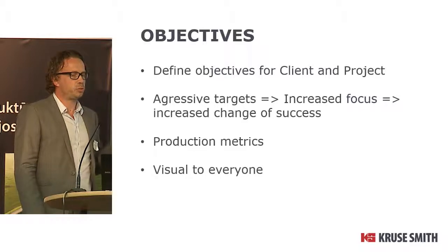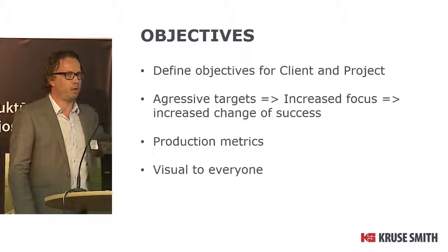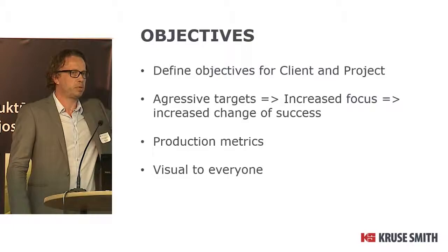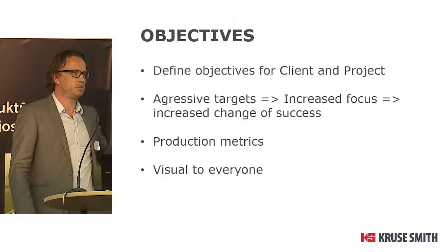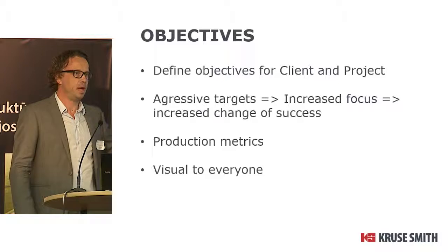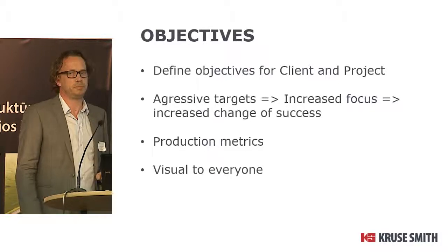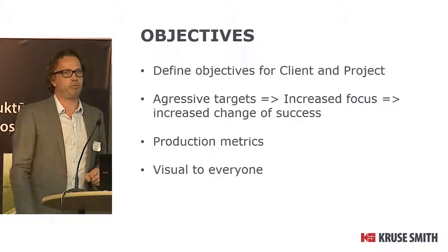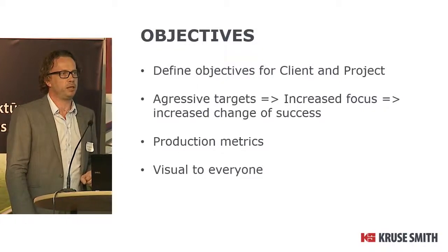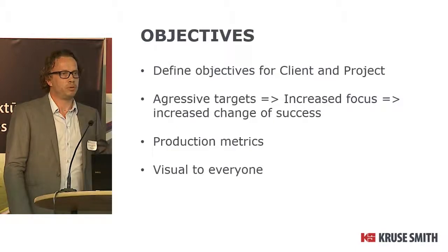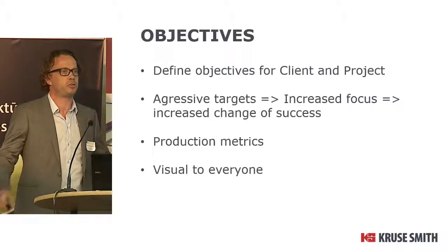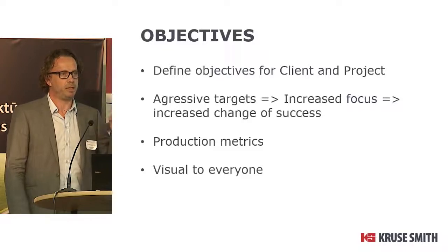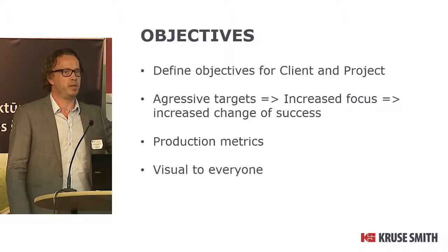And always do production metrics. You have a long-term objective at the end of the project, but you need to measure every week. How do you proceed? Very easy. Think of a runner setting a new world record running a marathon. He doesn't start and then 2 hours and 15 minutes later know whether it was a success or not. He knows for every 100 meters where he's at.